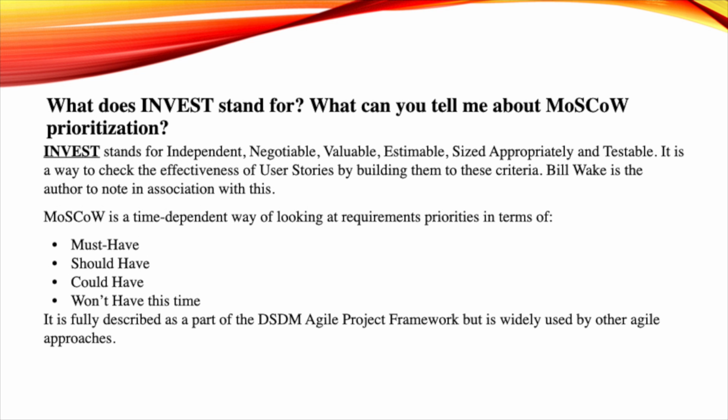What does INVEST stand for? What can you tell me about MoSCoW prioritization? INVEST stands for independent, negotiable, valuable, estimable, sized appropriately, and testable. It is a way to check the effectiveness of user stories by building them to these criteria. Bill Wake is the author to note in association with this.